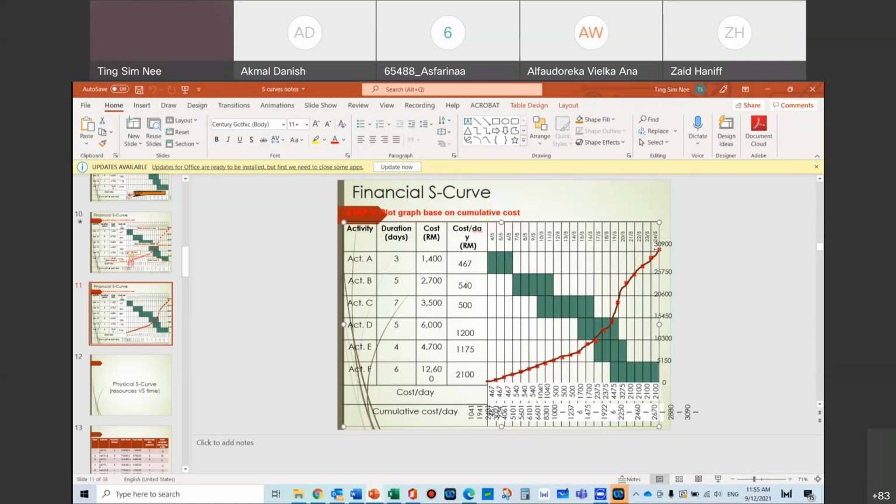You also have another PV, correct? So with these two PVs here, you will see that if there's any big, huge difference between what they pay you and what you need to spend, you need to get that amount of money ready over time. Okay, so this is initially at the very beginning of the project. If you do that, then you will see that, okay, by certain months, I'm actually spending this amount of money already.